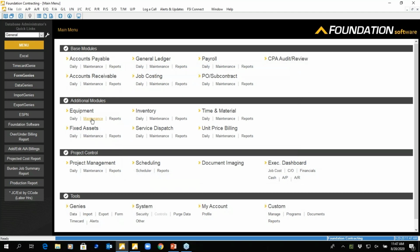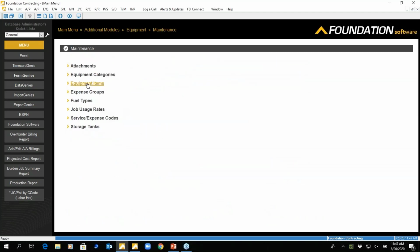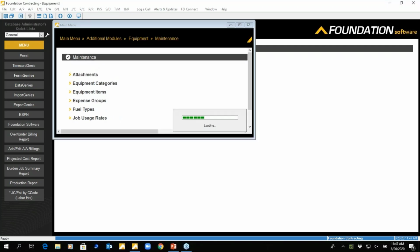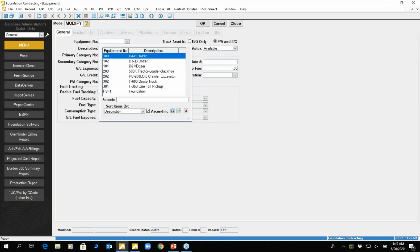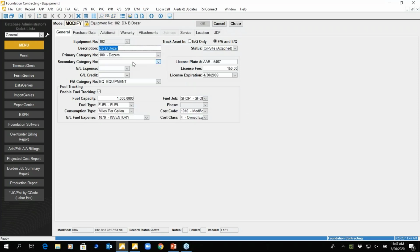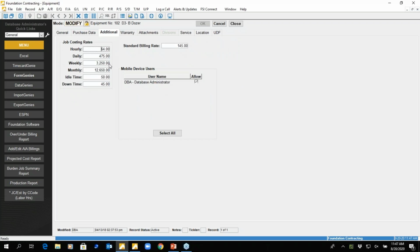With the equipment side, being able to job cost that equipment. If you're using an off-the-shelf system, something that's not construction specific, it's always going to be something that doesn't get back into that. It's one of the other items on the spreadsheet, or something that you don't really have a good gauge of where your equipment costs are at. Mike had demonstrated being able to take a piece of equipment in the field, code it to a cost code, to a job, and what we can then do is integrate that together by implementing some equipment rates, which could then also update your job cost in real time. And we can do that all in one shot when it comes to the payroll process.